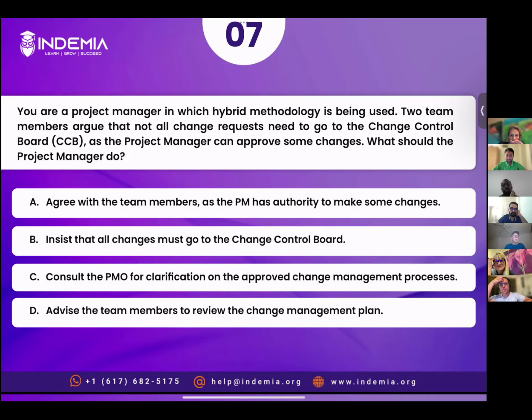All right. But Marta, the problem with this conclusion that we got from the previous question is that there was no other option, like, for example, approve the change. So, for example, the project manager may have some authority to approve changes, but that was not the option. If that had been the option, maybe our answer would be different. You understand that? But there was no option. The only option that was relevant in that scenario was to send the change to the CCB, right? Because we don't send the change to the sponsor, we don't send the change to the client, we don't communicate unless it is approved or rejected or deferred. So in that situation, yes, that was the right answer. Okay, right. Good try.